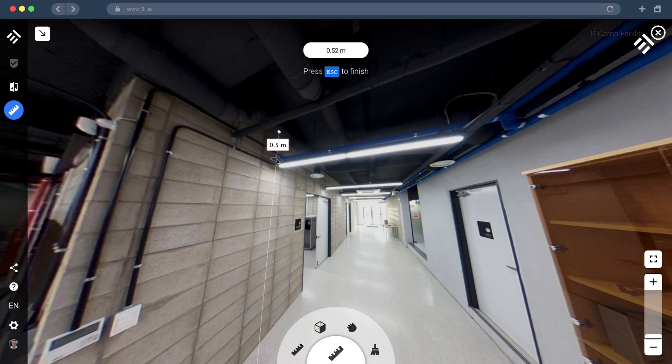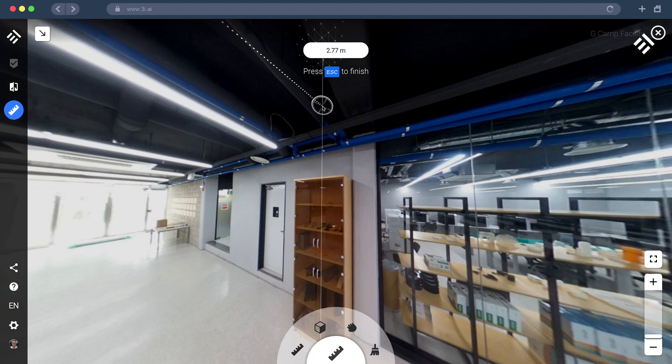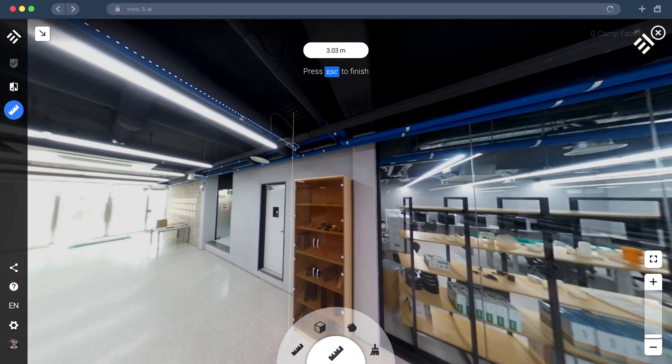For example, our clients use this feature to measure cables and pipes on the ceiling to estimate the amount of materials they would need in advance.